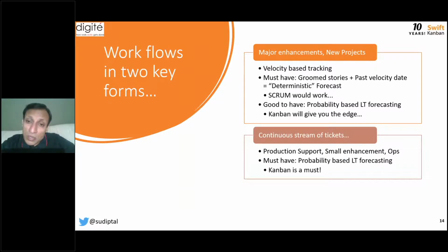And obviously you would have your past lead time data to be able to go back to business and say, hey, I'm not being subjective, I'm giving you objective data, real data of what has happened in the past. So let's now have a meaningful discussion about how much we need to prioritize and what we can really do within the timeline that you're planning to be done.